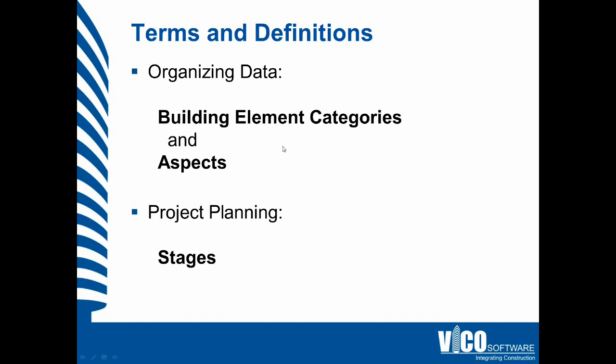For project planning, we use stages. We use stages that are numbered rather than phases such as 50% CDs or 90% CDs that you typically use, because we believe that with building information models you will have more stages than the traditional phases.